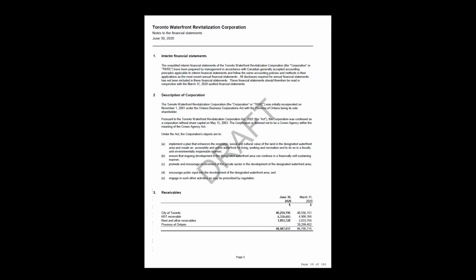So that would be released. David, when would that be released? In a couple of years' time, once they're satisfied? That's right. Once we've shown them that we've constructed the additional habitat and that it is surviving, so it's a several-year process. At that point, they'll release the letter of credit. There's only one letter of credit outstanding, and it's just under 3 million.